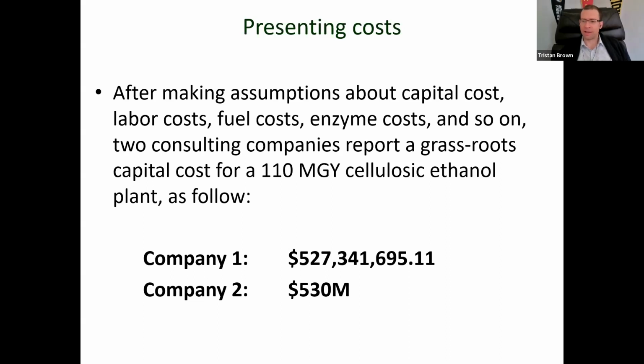For techno-economic analysis, this is important to understand, right? We're generally going to want to do the second one rather than the first one. Now, if you're talking very site-specific analyses, that's where that first one becomes important because you need to know every single penny. But for the techno-economic analysis, fewer significant digits is important. Again, we're talking about a plus or minus 30% range of uncertainty. So calculating out to the individual dollar or worse, the individual penny, doesn't really work because you're already talking a plus or minus 30% range of uncertainty.